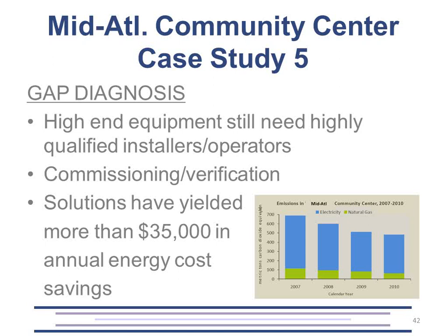As always, the maintenance and operations staff, whether that's the customer or a separate third-party contractor or service provider, must be properly trained on how the systems differ from traditional systems. Even with a lot of experience, installers and operators may not always understand the costly impacts to the long-term building operation. In this case, the study identified deficiencies that, after eventually being resolved, reduced the building's operating costs by $35,000 annually.